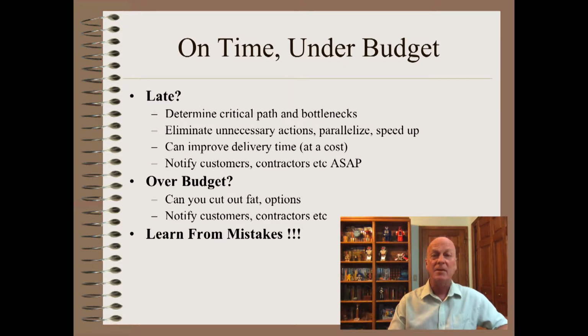So, what happens if you are late? You can restudy the problem to see if there are bottlenecks that can be avoided that were not anticipated in the first project plan. You can consider parallelizing efforts. An example is to install a machine using 2 12-hour shifts or 3 8-hour shifts instead of working a normal business day. Note that parallelizing and other attempts to speed up a project are very likely to cost more money.